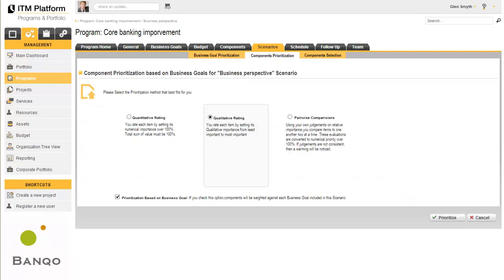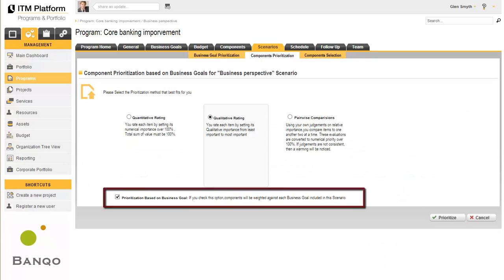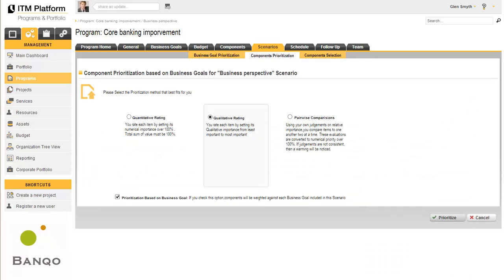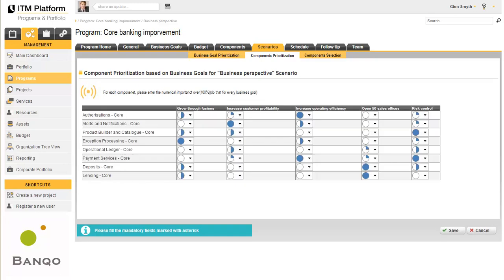Projects can be compared in the same way. It is even possible to compare projects based on the objectives associated with the program. In this case, we have decided to perform a qualitative rating to establish the contribution made by each project to each objective.